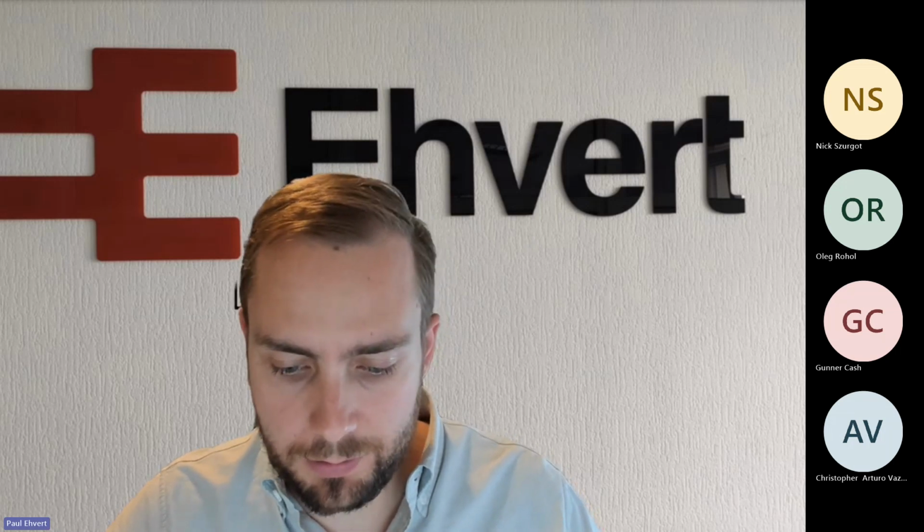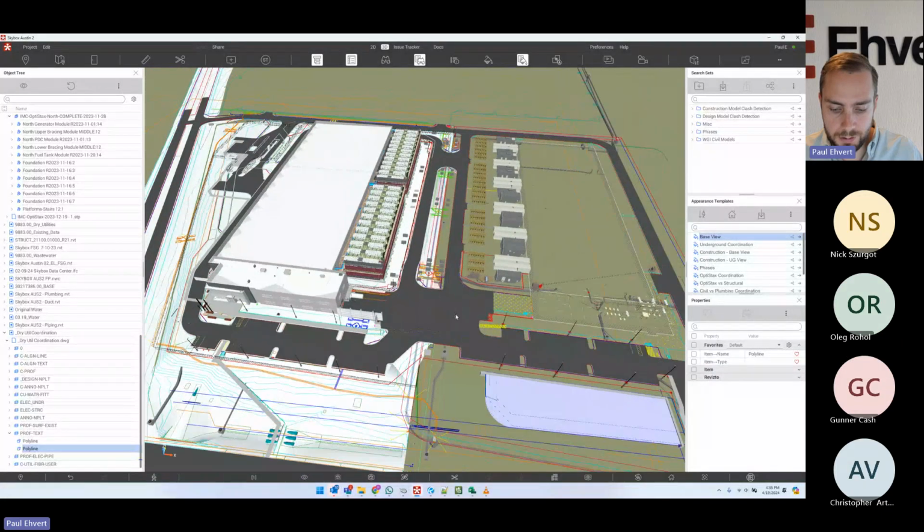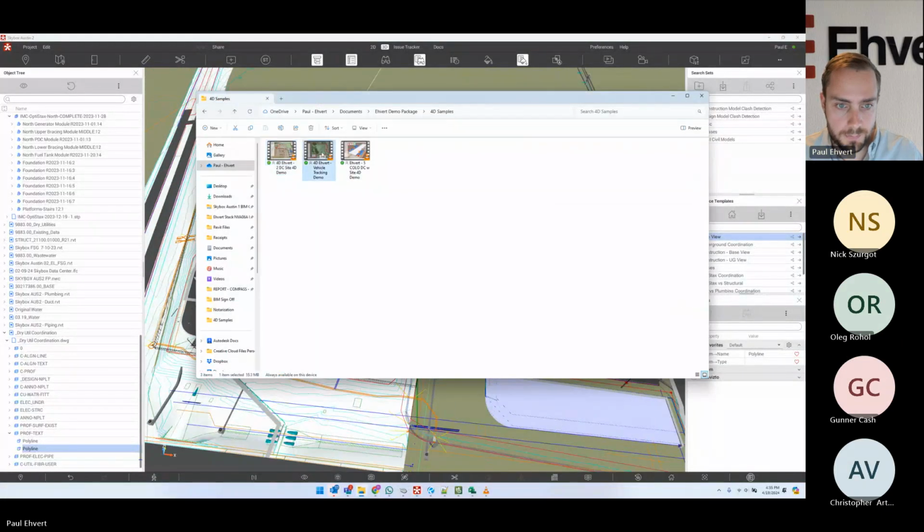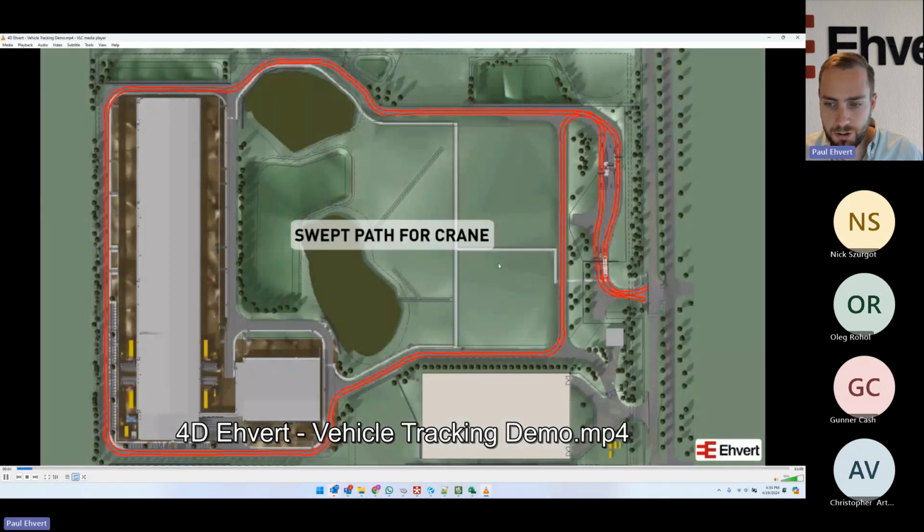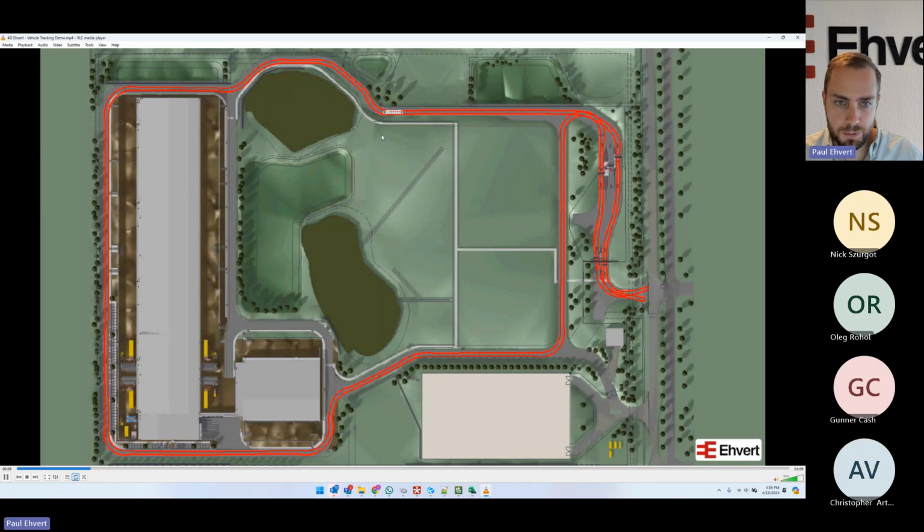All right. Well, I think in terms of getting started, just knowing where construction vehicles are coming in. One other item I did want to ask: I know you showed that construction logistics plan earlier. Has there been any type of confirmation? We do vehicle tracking studies where we make sure, for the cranes and the larger delivery vehicles, that there's actually enough space on the roads, with radius and stuff like that accommodated.